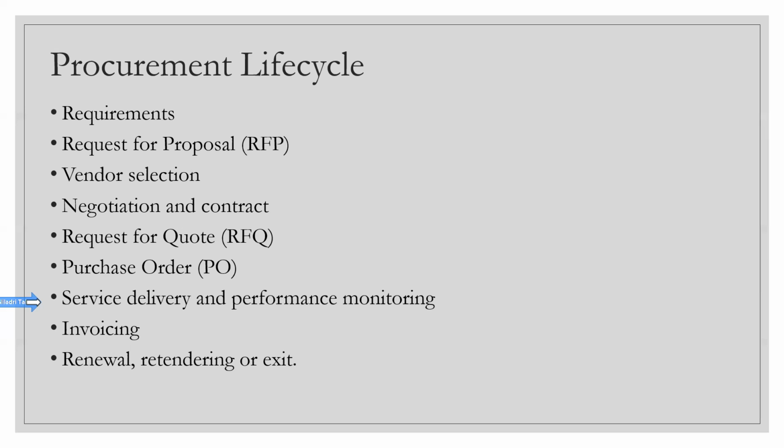And then it is the job of the procurement team again to share the purchase order with the vendor. If you are part of a small company, then you probably will be sharing the purchase order with the vendor yourself. But in this case, the procurement team will be sharing the purchase order with the vendor, and they will keep track of it. Even the delivery TPM has to keep track of it, in your work front, like the PM tool and a few other places. You have to keep track of the PO just to ensure that you know how much you're spending on this program, right?